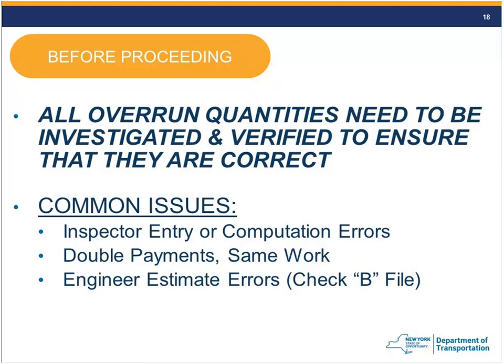If entries are verified correct, there may simply be an engineer's estimate error. Check all DWR entries, confirm no double payments, and then review the engineer's estimate — sometimes called the B file — for errors. If there was a design error, that must be verified before using the canned 'design error' explanation in Site Manager.